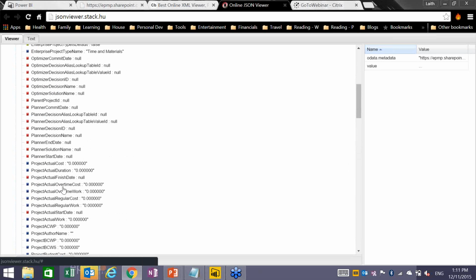I don't know. So basically, it is something that Microsoft has predefined in terms of what out-of-the-box fields you get when you browse to this URL through the OData Feed. And even more, when it comes to custom fields, it is limited to 45 text custom fields. So if you have more than 45 project text fields, you're basically only going to get 45 of them. You're not going to get everything. Now, having said that, there are ways around it using JSON to overcome those limitations and get almost everything through Project Online. But the simpler OData read that you can deal with quite easily has few limitations.